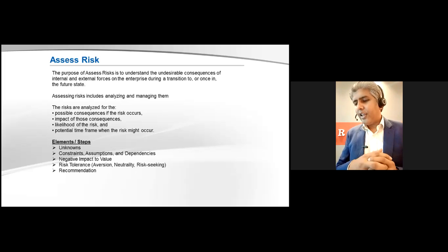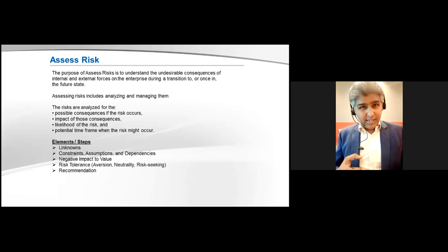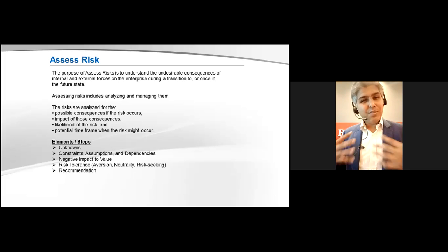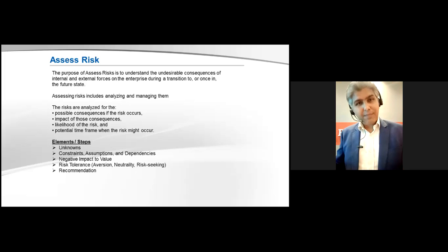Okay, and then you define your strategy for that risk, whether you will mitigate that risk, meaning you have a parallel strategy of solving that problem, or you'll just afford that risk, meaning let the risk happen and you will accept that risk and have the timelines impacted.